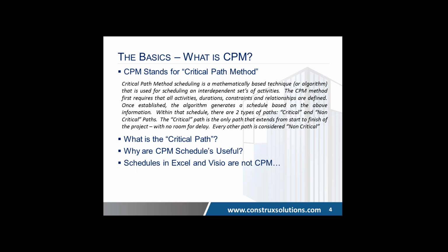So the focus of these critical path method schedules is to focus on, first and foremost, that critical path. Make sure, come hell or high water, that these set of activities are done in accordance with the plan. But what happens to all the other activities? They actually have this thing called float. Float is ultimately room for delay.